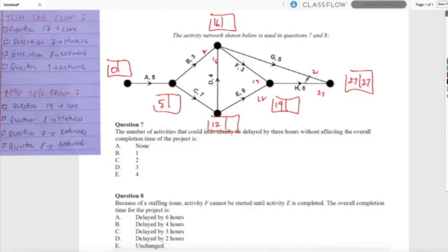Back scan. Now we're putting in the smallest possible. 19 goes there. No other way. 2 ways to get there. There's 16. Yep. That's the smallest, because 27 minus 15. So 16 goes there. There's 2 ways to go there. 12. Yep. 12. And now we've got 5. 17. 12 minus 7. 5. 0. Okay. Critical path. I don't even know if we're going to need it, but just do it.